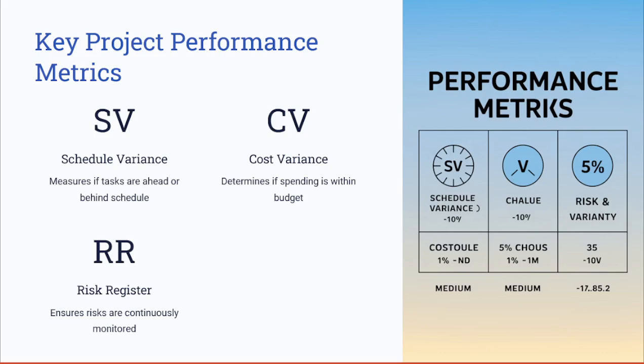But to make it simple, you have a baseline of $20,000 as the budget when you plan the project. But when you compare it with the actual cost you have already spent, which is $25,000, you have a cost variance of $5,000. And here you need to take corrective action by submitting a change request to realign the project with the planned costs.